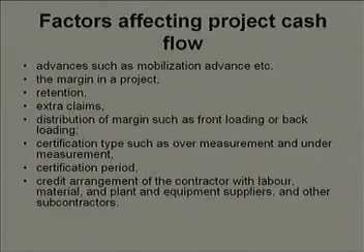Similarly, the last point of the slide talks of credit arrangement. Credit arrangement is basically the arrangement that you have with your vendor, with your labor supplier, with your equipment supplier, with your other subcontractors. So, depending on how much credit period you enjoy, it will have different kinds of impact on the project cash flow diagram.